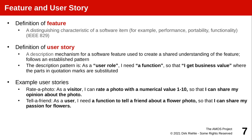A feature is a distinguishing characteristic of a software: performance as a functional item like being able to show photos, but also performance features, stability, and so forth — meaning non-functional requirements. There are many different ways to describe or specify a feature, and we use the user story, a very lightweight form of capturing requirements. A user story follows a sentence pattern: as a user I need a function so that I get some business value. Three parts: who am I, what do I need, why is that valuable.